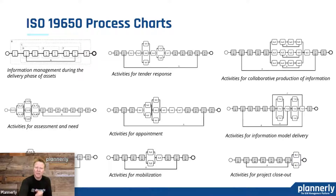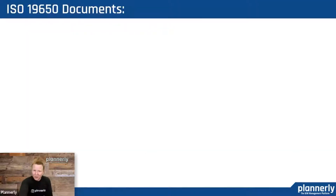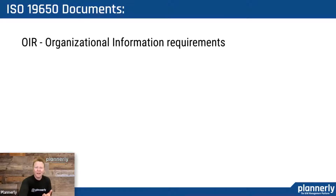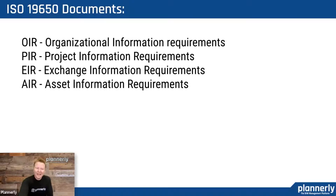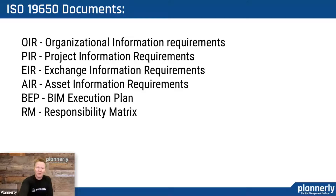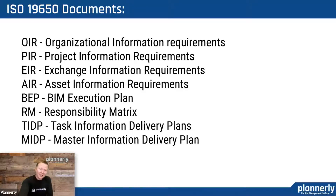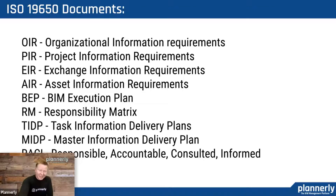There are eight steps unpacked in diagrams with lots of detailed requirements. As a result, there are a lot of documents that might need to be created by different teams at different stages throughout the project. They range from the organizational, the project, the exchange, the asset, execution planning, responsibility matrix, and task and master information delivery plans, RACI charts, and many others. So there are lots of outputs required as a result of these steps in the workflow.